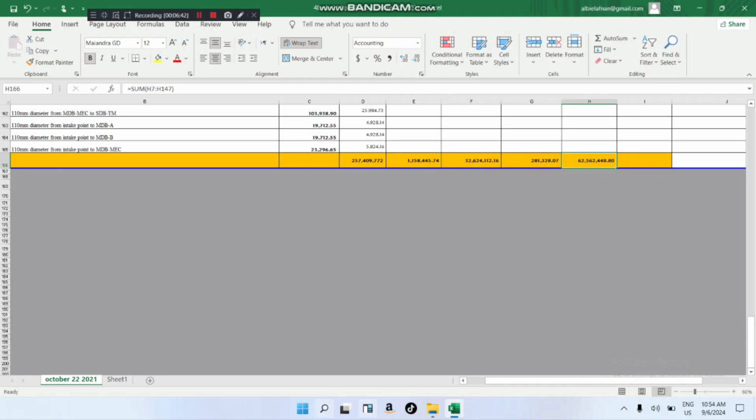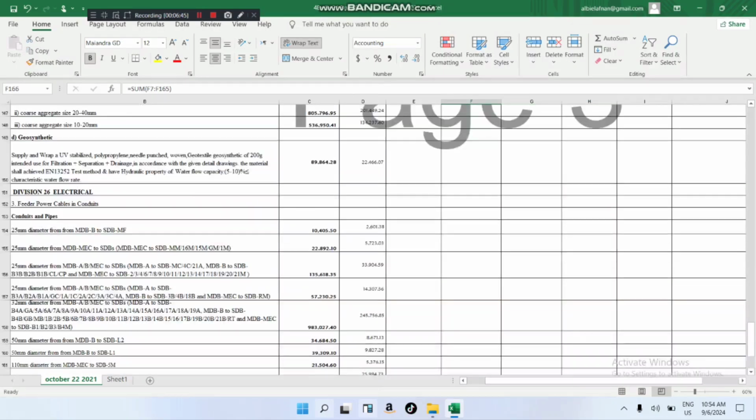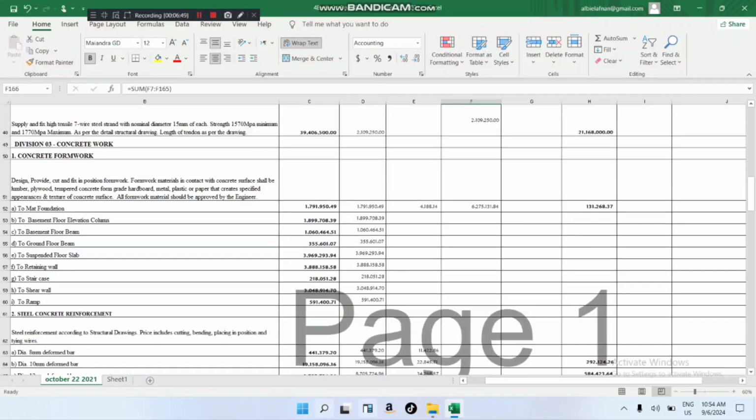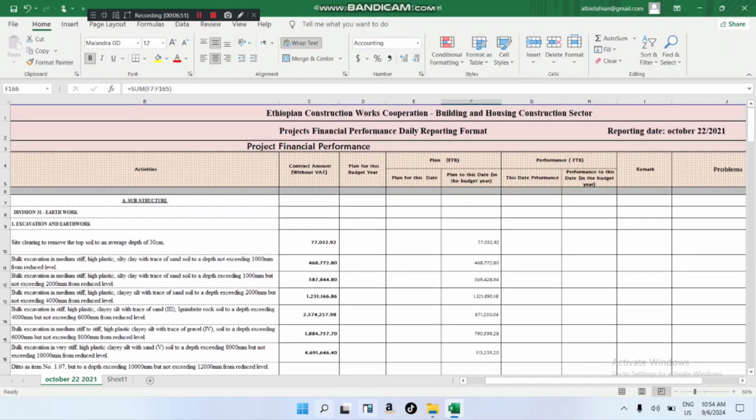We didn't exceed the contract amount. If it exceeds, you need another contract, like an amended contract, and you have to explain everything that caused the delay, the change that caused the amendment, why you want to exceed.